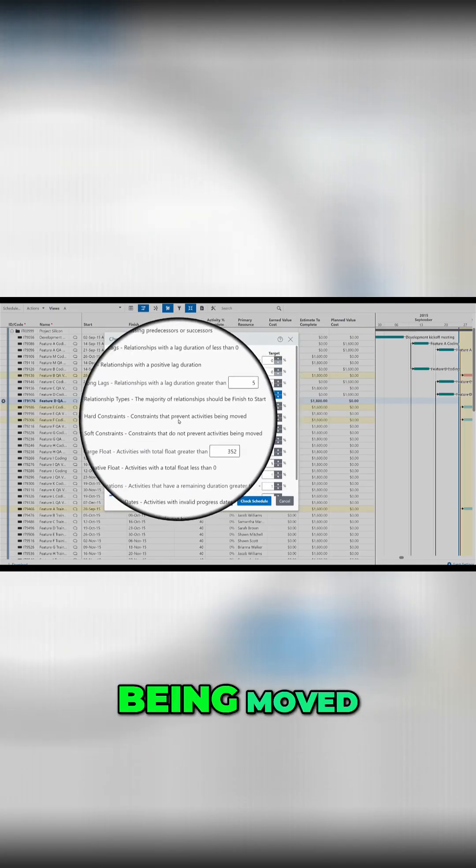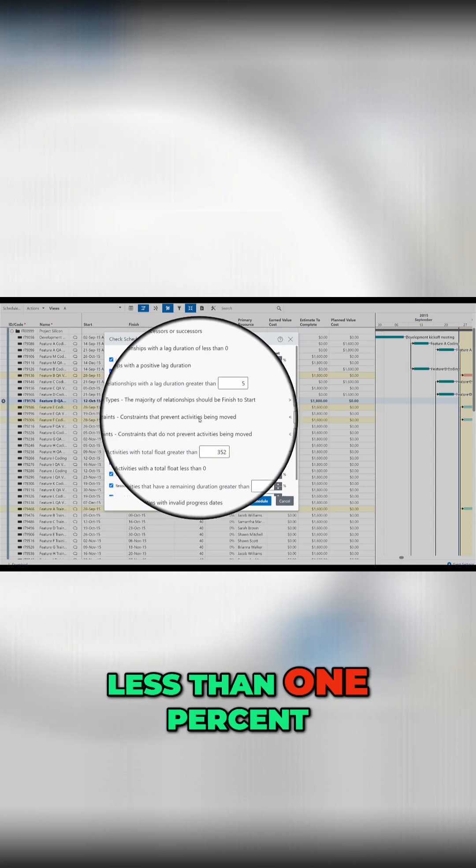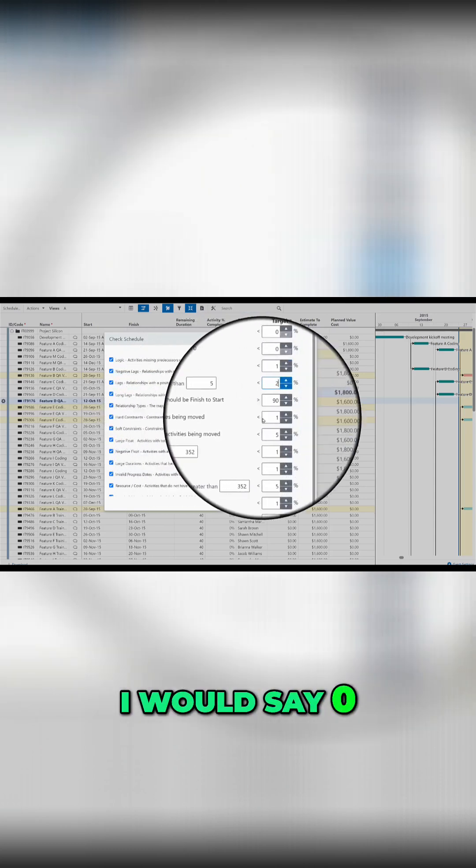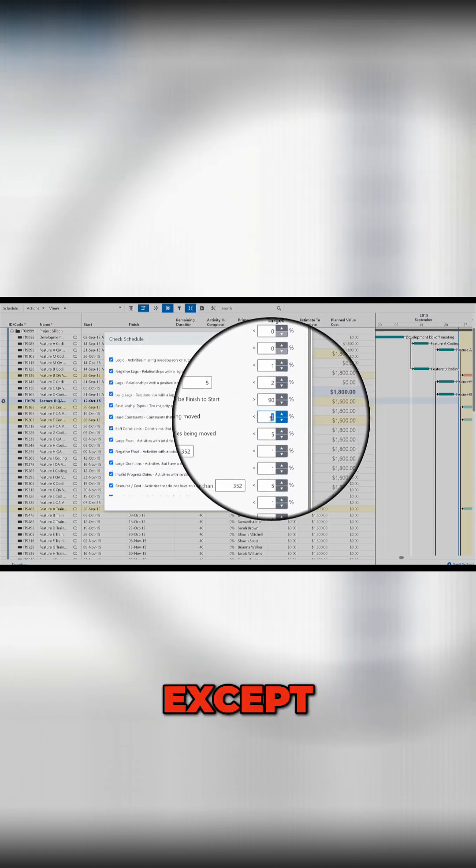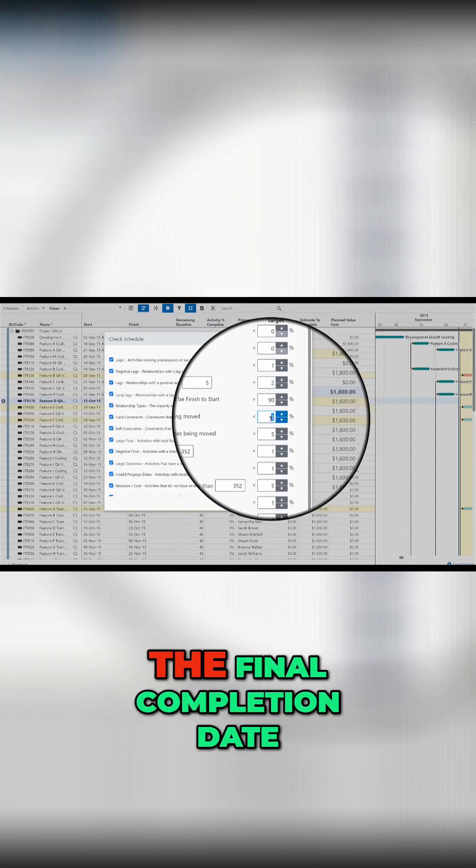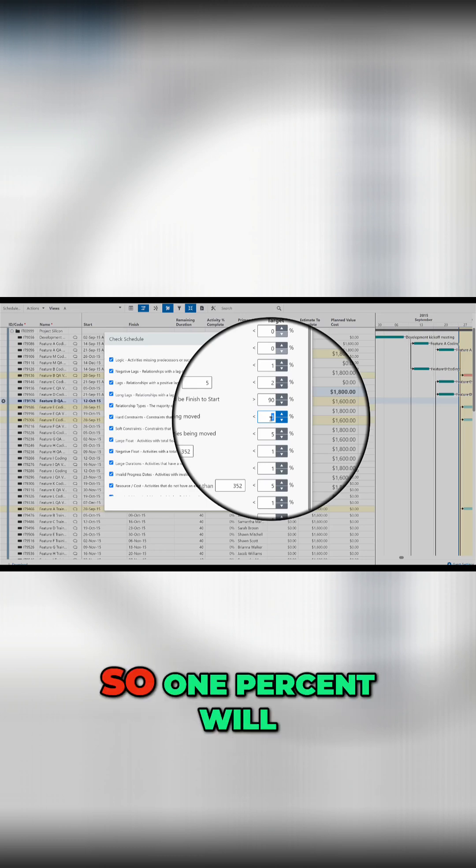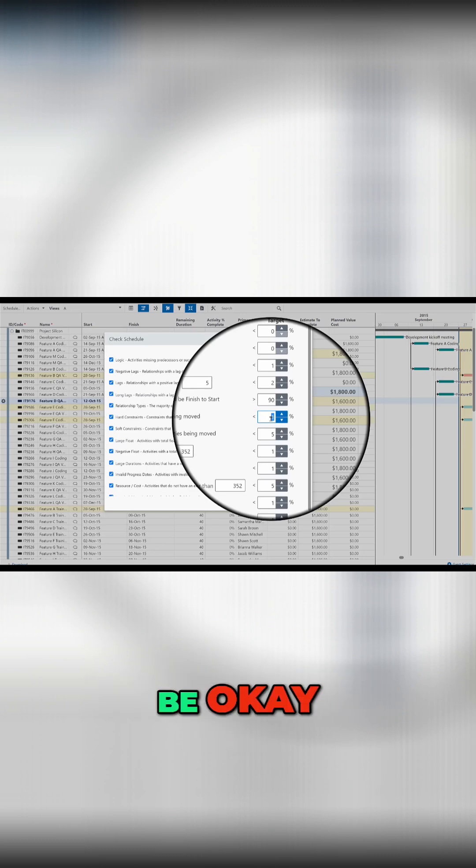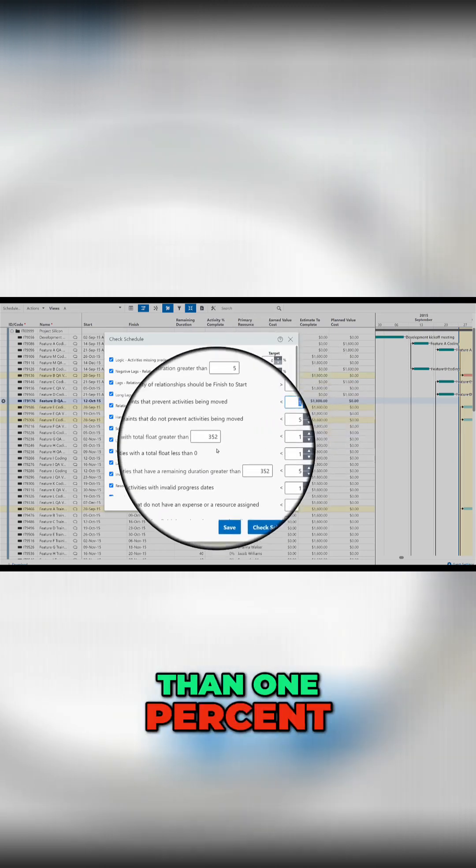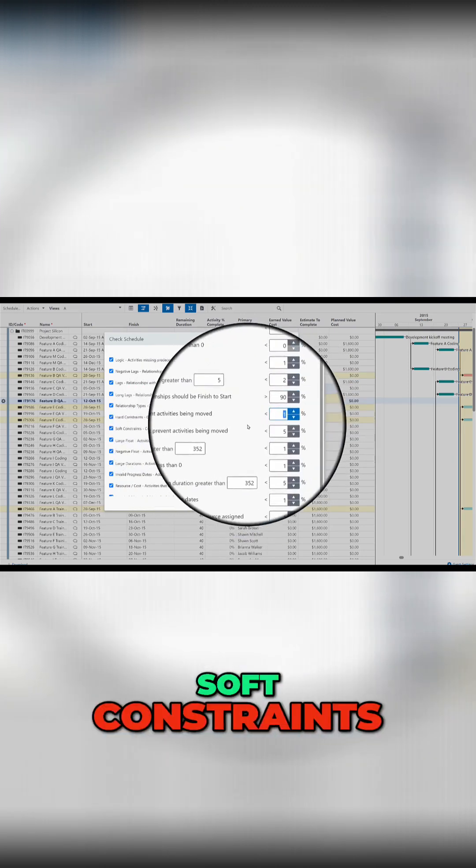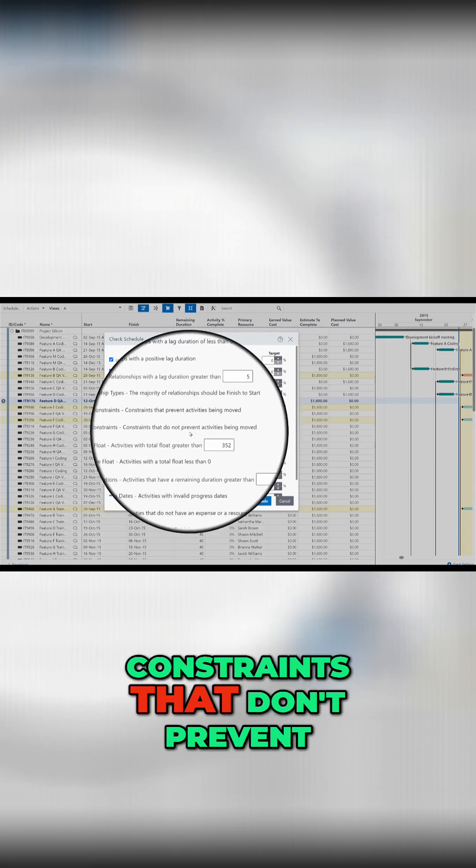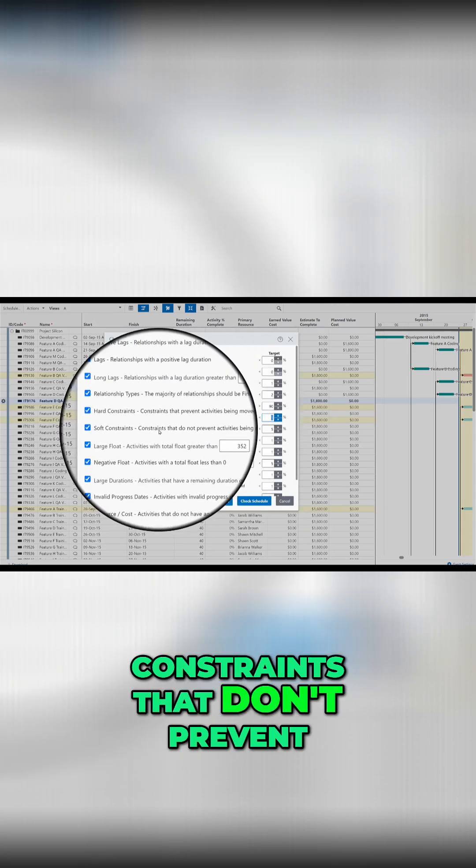Hard constraints. Constraints that prevent activities being moved, less than 1%, I will say zero. Accept the final completion date, so 1% will be okay. So it is less than 1%. Soft constraints.